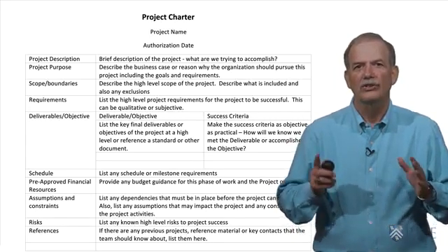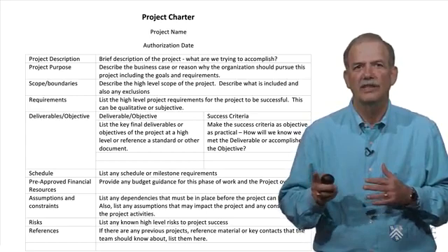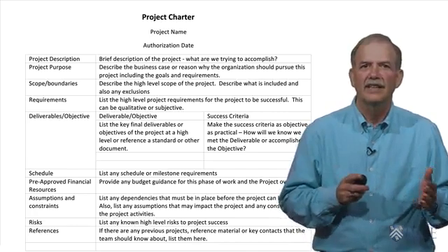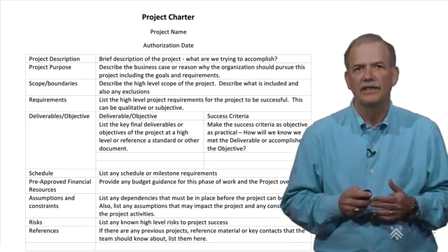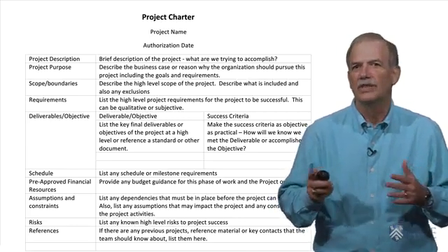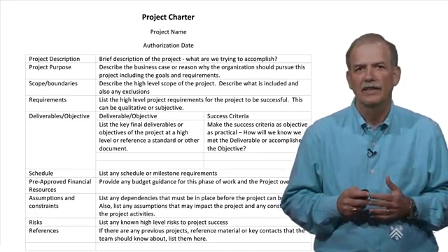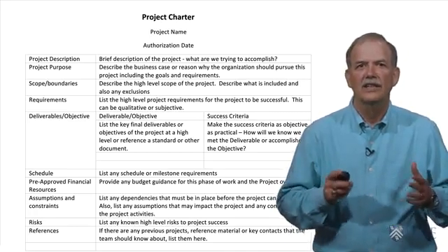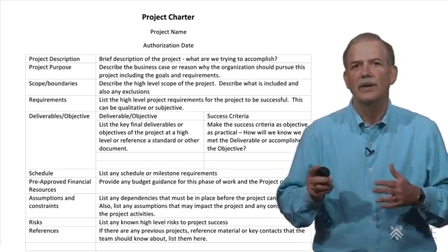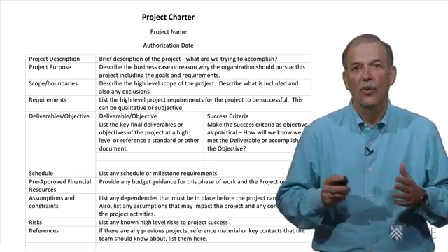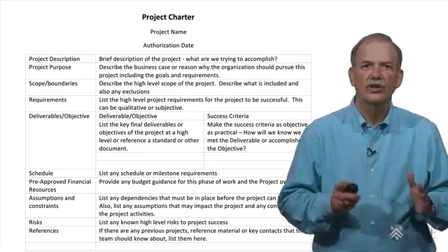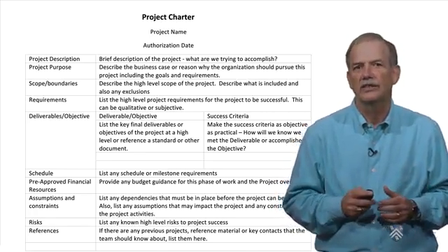The project charter should also contain any information that is available on schedule milestones or requirements. These might include the start dates, in-service date, any approval dates, etc. It is also good to include any budget limitations, assumptions, and constraints, and major risks known at the time of the authorization. The assumptions and constraints section documents key dependencies that are key to the project's success, such as the plan is based on finding an expert, or the project cannot start until the money is available. This section should also include any other known limits on the project.